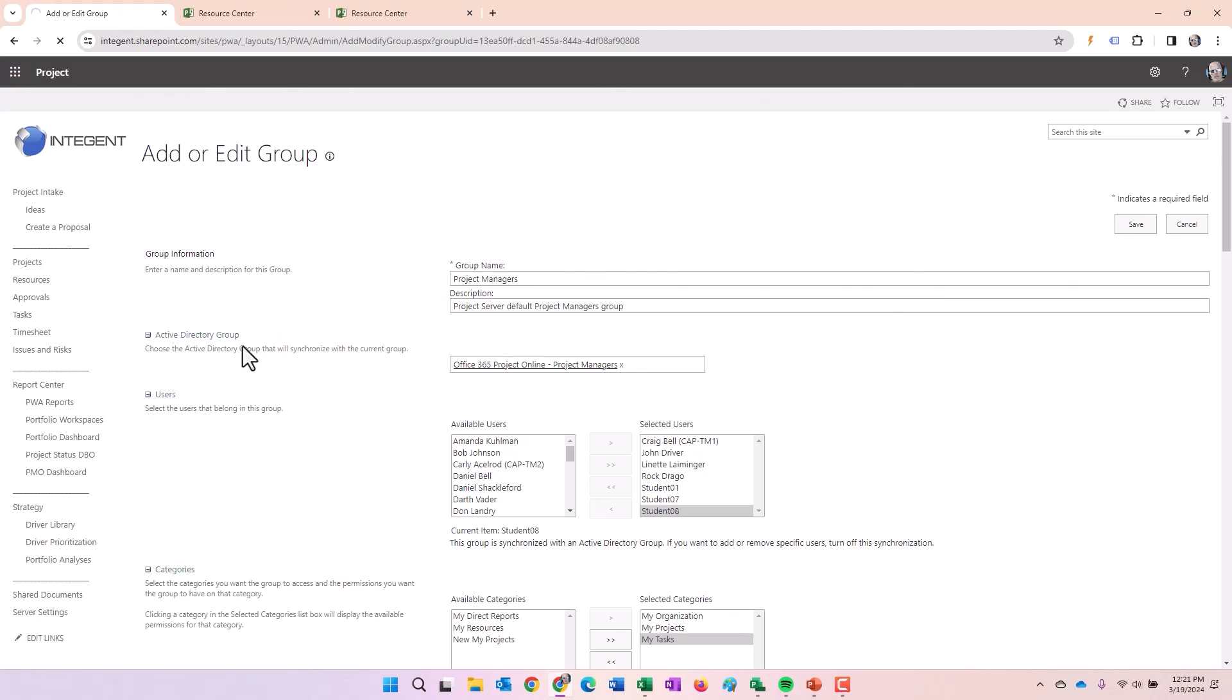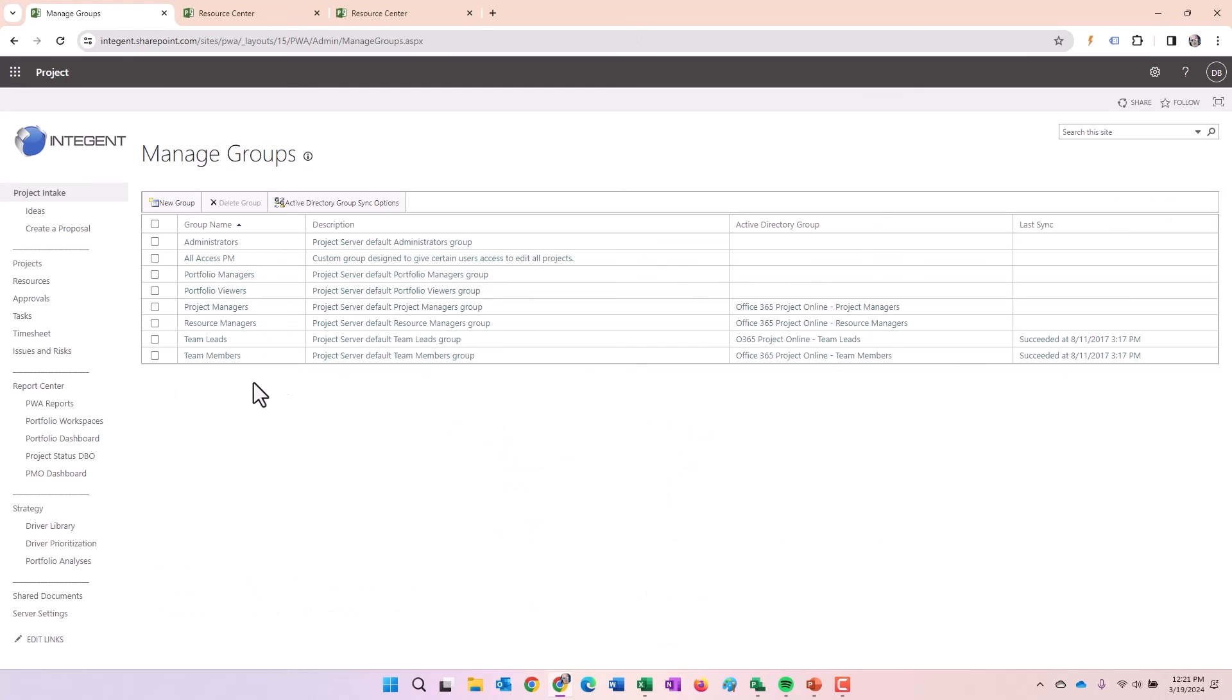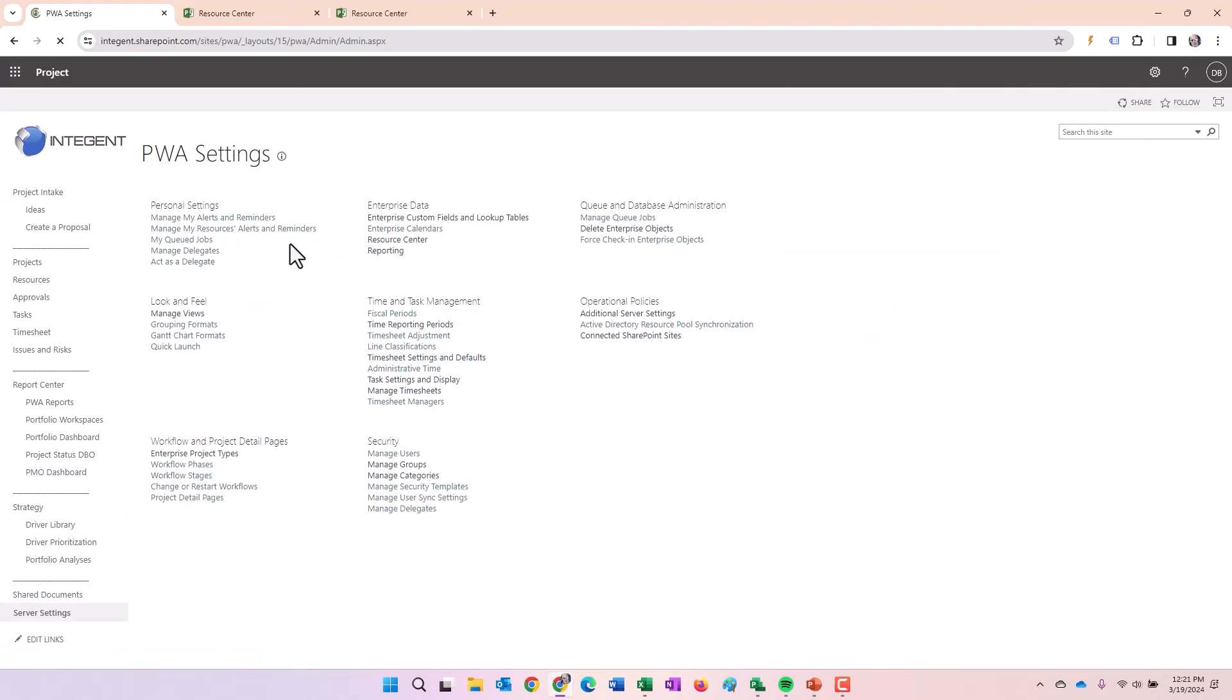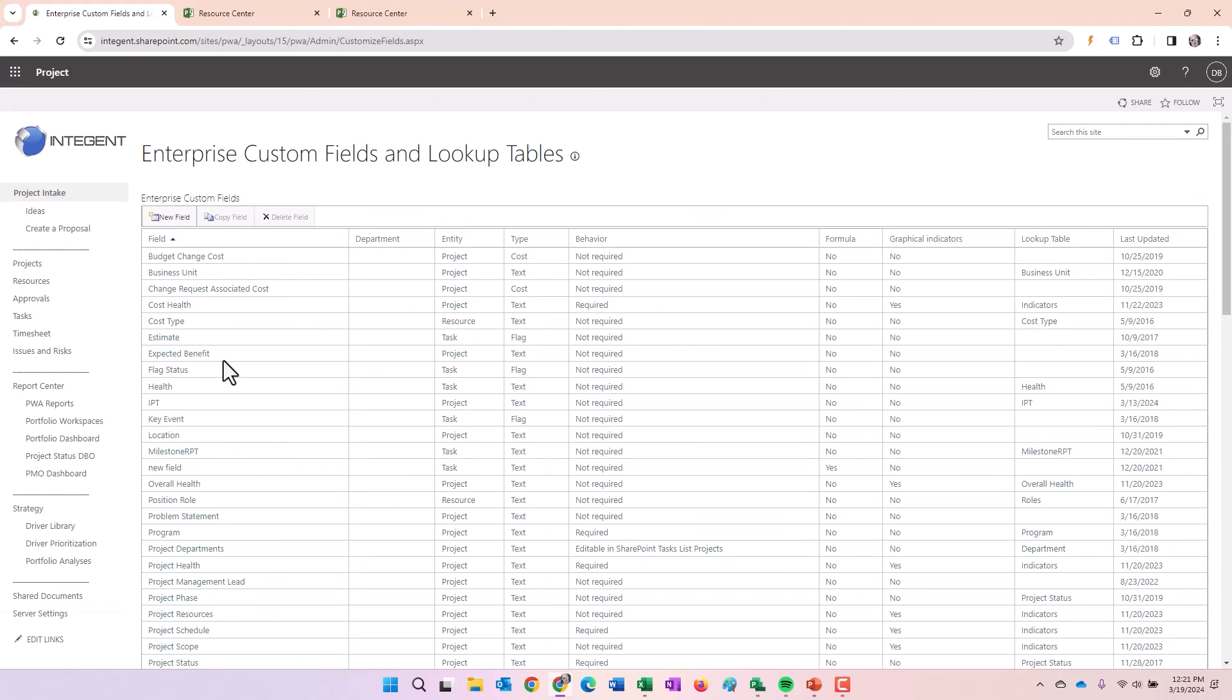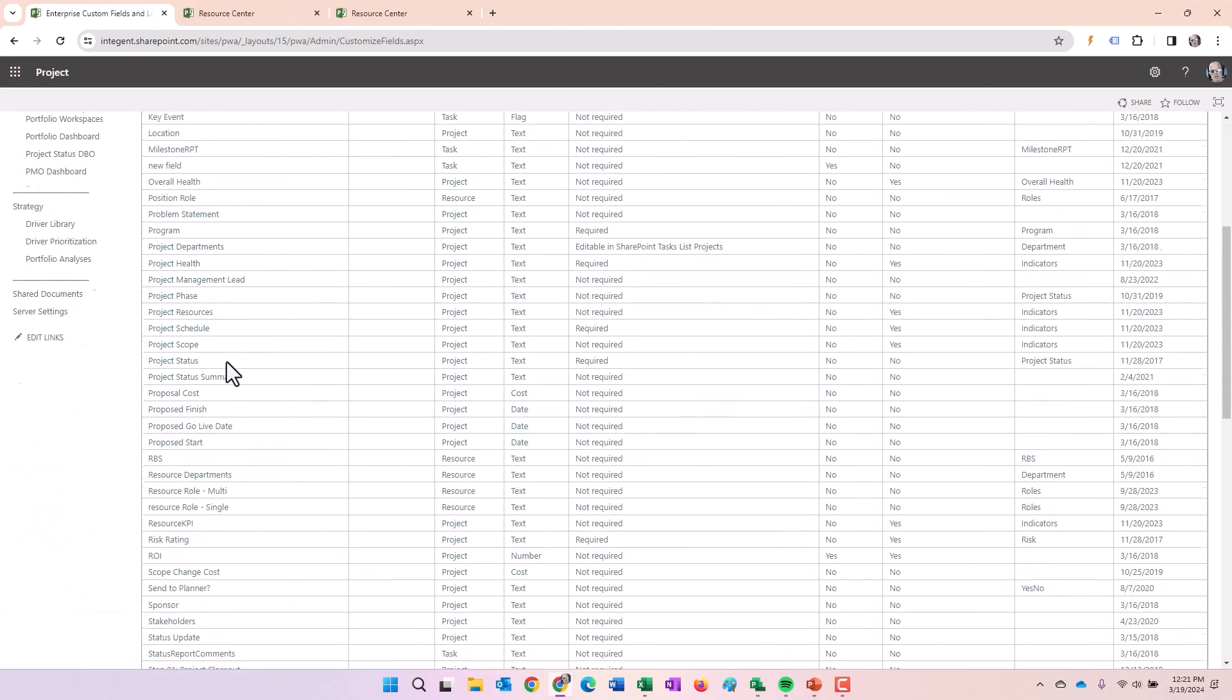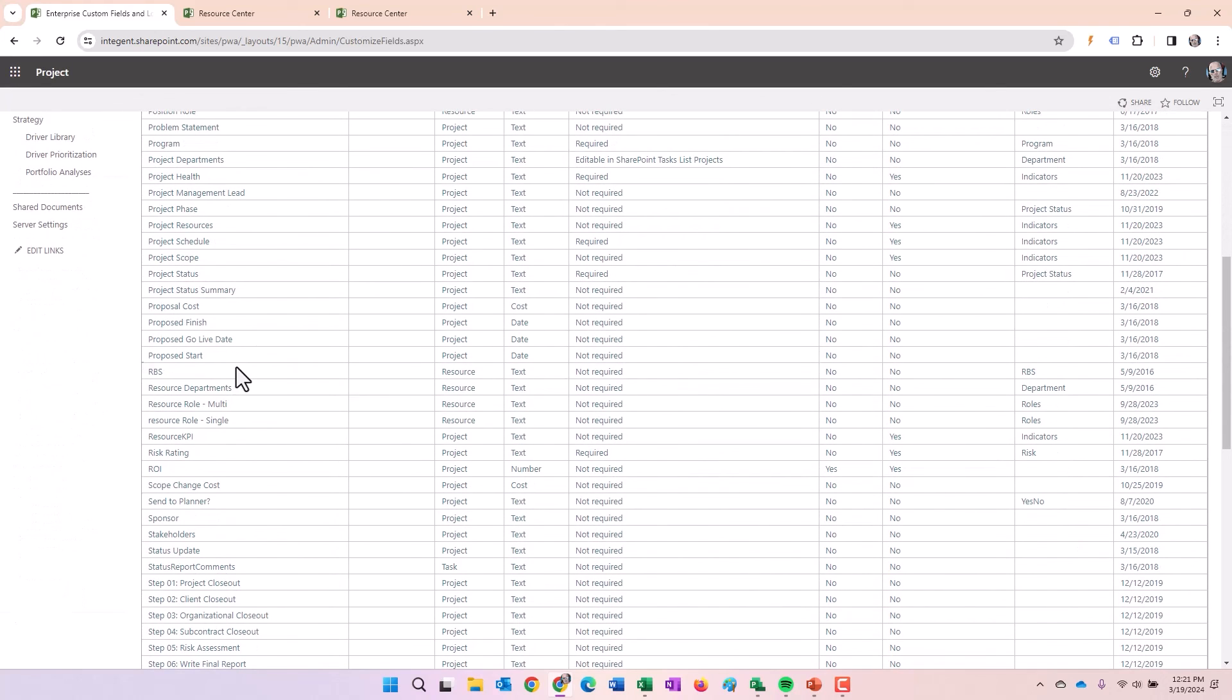Now with regard to the resource breakdown structure, you saw how the values are assigned. Where is it set? In service settings under enterprise custom fields and lookup tables, resource breakdown structure or RBS for short. That's actually a default field. You can see the RBS field here. The field references a lookup table called RBS.